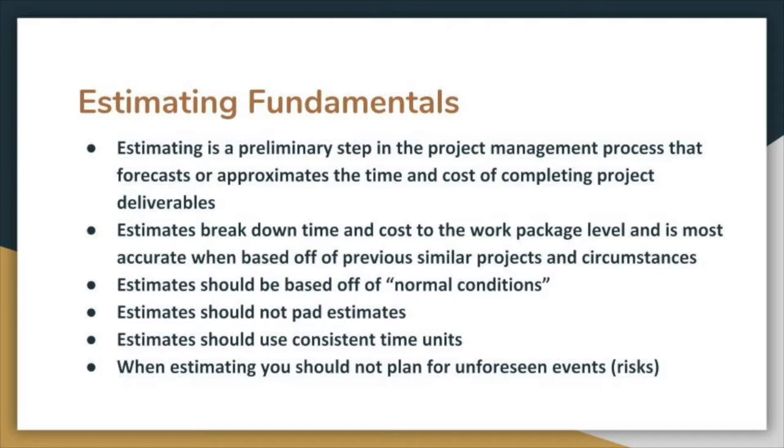Forecasts or approximates the time and cost of completing a project. The estimates break down the time and cost of the work package level. That's typically more used in a bottom-up, but in top-down you can use it based off of previous projects so that you get an idea of where the entire project is going.